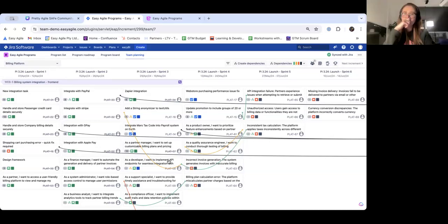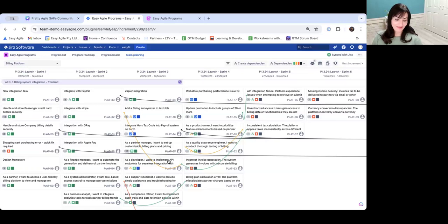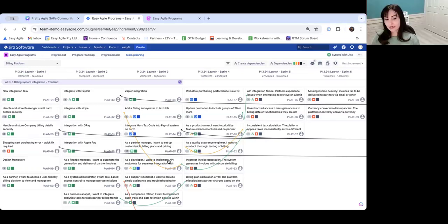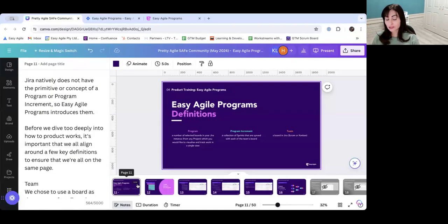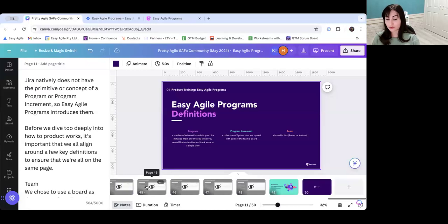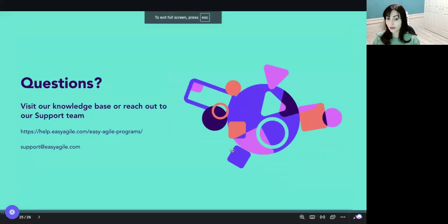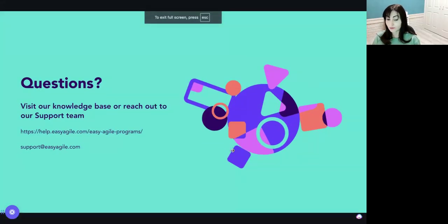So can I answer this, Hayley? Yeah, go for it, Mesa. At the moment with the current product, if you are resolving a risk, either by moving the scheduling to a different sprint or fixing these dependencies, the dependency line is not going to disappear, but the color of it is going to change to green, for example.